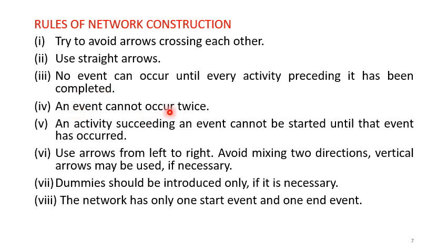An event cannot occur twice. For example, start activity A is an event. So start activity A cannot occur twice. Similarly, finish activity A is an event. Finish activity A cannot happen twice. After finish activity A, the next event will be the start event, the succeeding event.